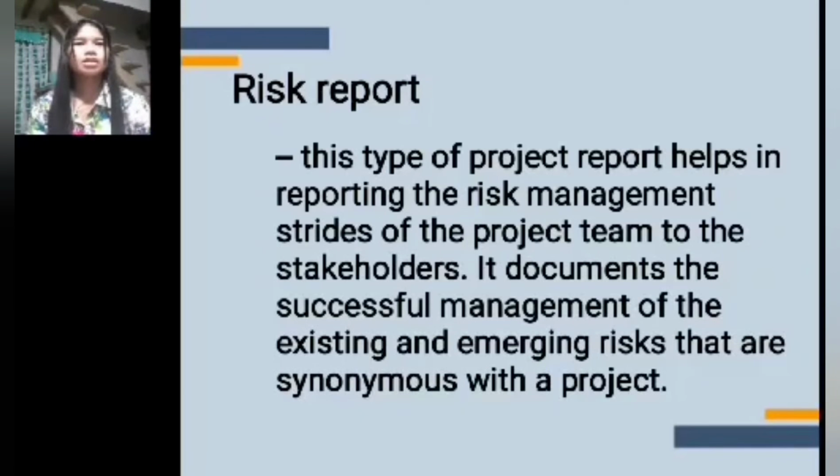Risk report. This type of project report helps in reporting the risk management strides of the project team to the stakeholders. It documents the successful management of the existing and emerging risks that are synonymous with a project. The risk report should include a brief statement of the risk profile of the project, the details of the risks that have the potential of truncating the project, and how you plan to manage them.